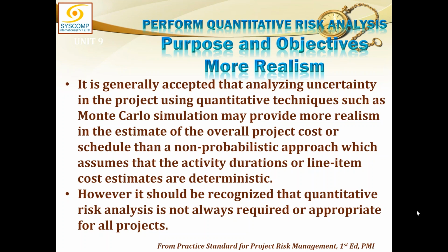Okay, that is simply, as Khayyam has said, the two extreme values, the pessimist value and the optimist value, find the difference between the two. So this is the margin between the two extremes, and we divide it in 6 parts because most likely had the majority, so we give 4 parts weightage to the majority, 1 part weightage to the optimist, and 1 part weightage to the pessimist. So it comes out to be 6 parts. So I divide it into 6 parts. Between the pessimist and optimist, the distance is 10 minus 1, 9 days. So 9 days, if I divide by 6, my standard deviation would be 1.5. Not the standard deviation, I would call it a deviation. My deviation would be 1.5.